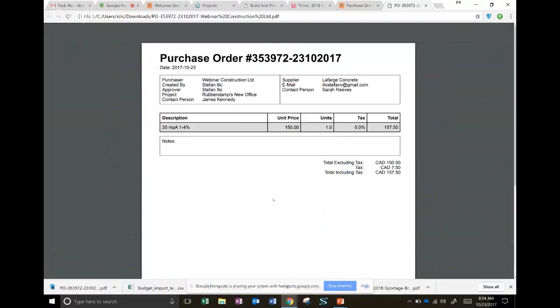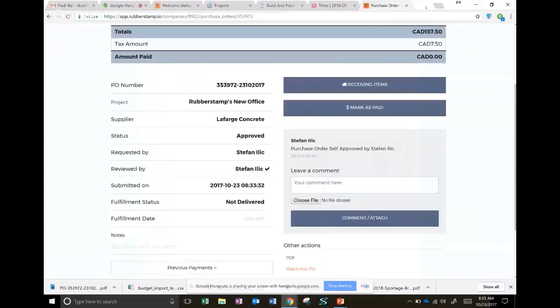And I did allude to that earlier in terms of what processes I implemented along with this, where I require suppliers to attach this purchase order directly to the invoice prior to sending their invoice in. Now, if you receive electronic invoices, they can email the PDF together with it, or they can make it into one PDF with their invoice. If you do hard copies, they can print it out, staple it together, and mail it to you. This has reduced greatly the amount of hours that our coordinator does. So that's probably the single most valued item, if I go by cost that I can touch, is the time that we got back from our coordinator.